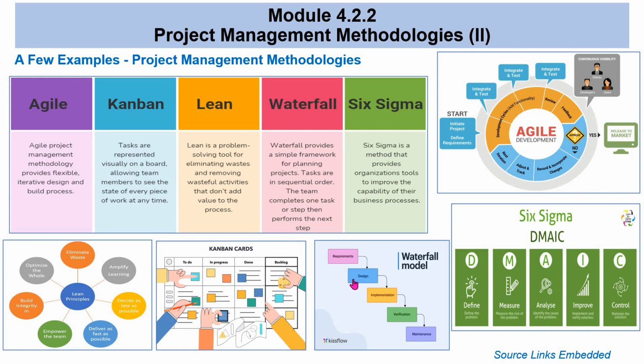And the waterfall model is simply a framework that goes sequentially from one stage to another, which means you need to complete one before going to the next phase. So for example, you set your requirements for a project before you start designing whatever you need to design. Then after the design, you start implementing the design, that is, building the actual thing you need to build. And after that, you test or verify, and later on you can maintain it.